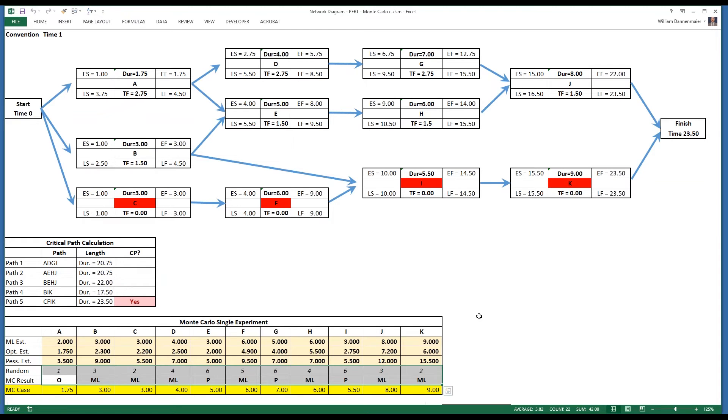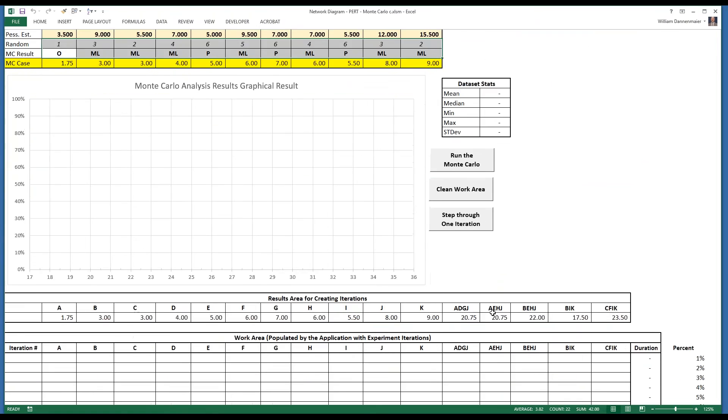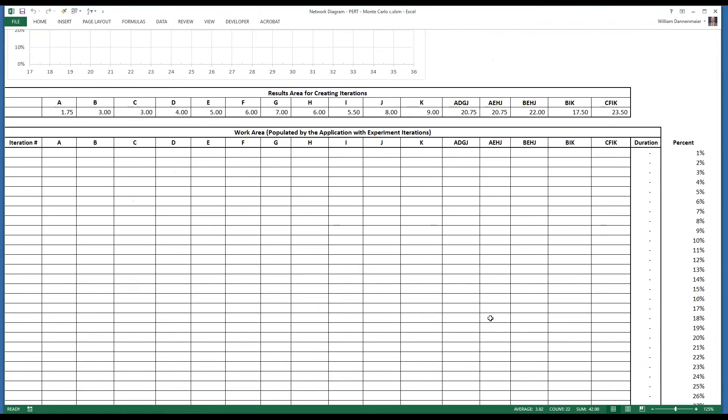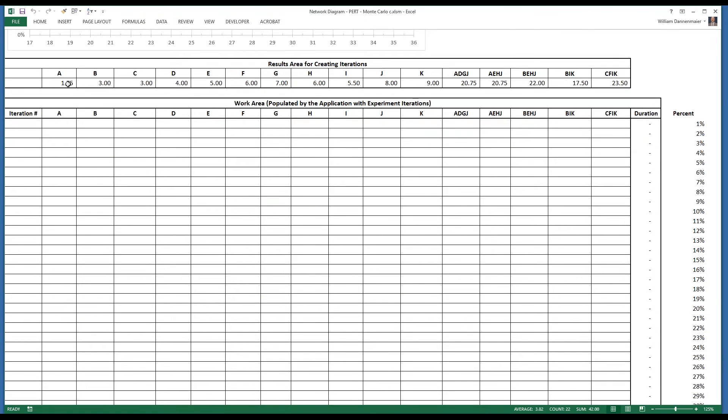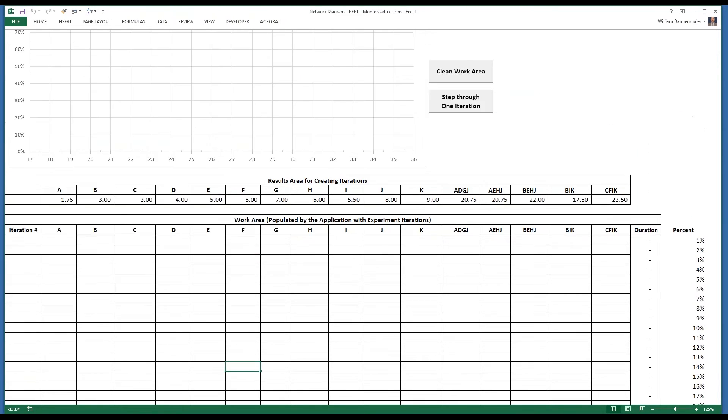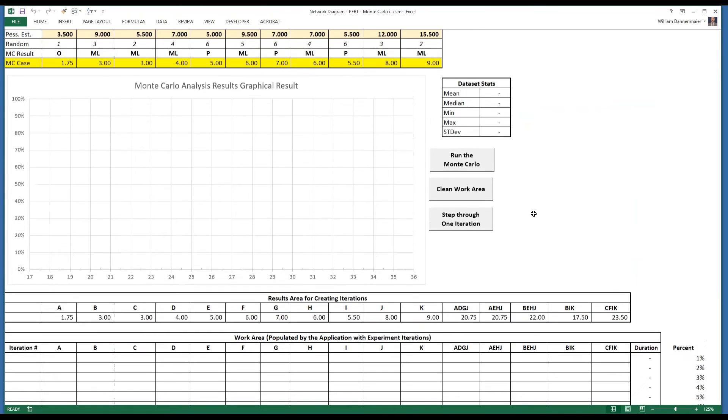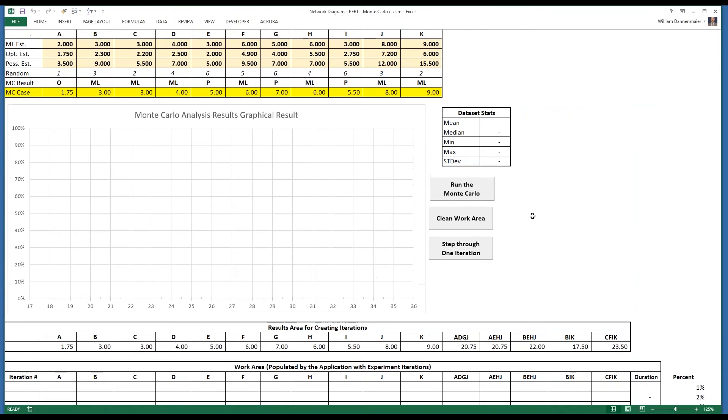In order to do a Monte Carlo analysis, what we're doing is accumulating iterations of the model. To accumulate iterations of the model, we capture the results of the model below, and we'll calculate 100 iterations as the model progresses through a Visual Basic program. This will then be graphed as our results. And this will be, by the way, only a 100 iteration Monte Carlo.